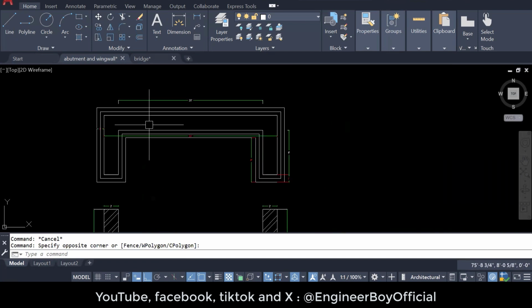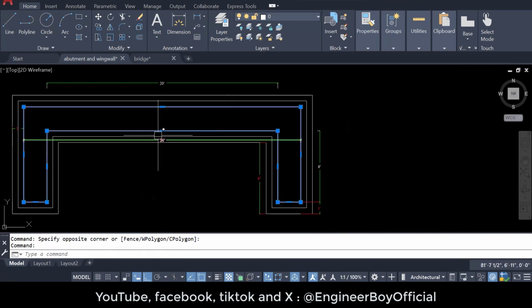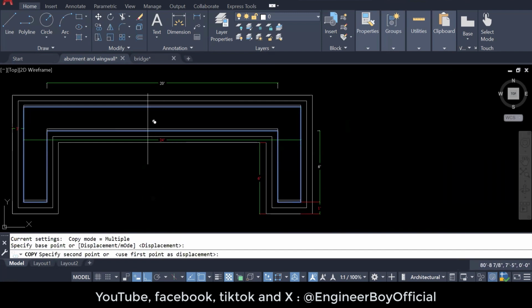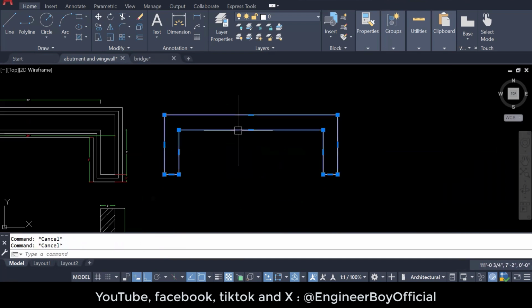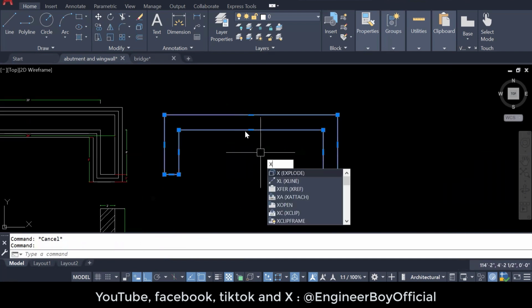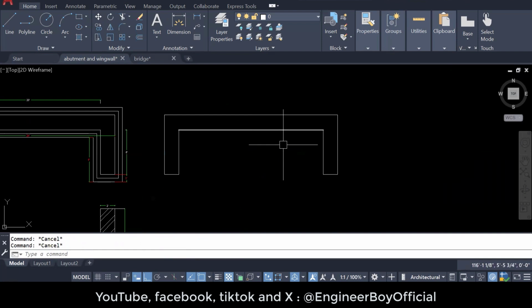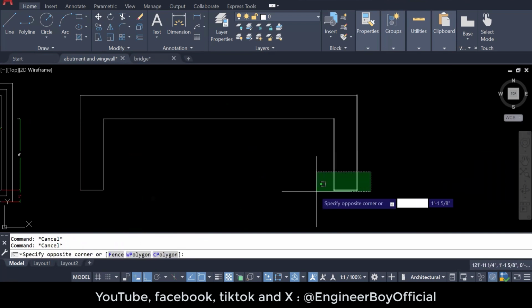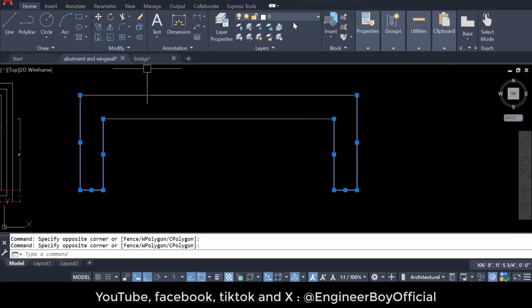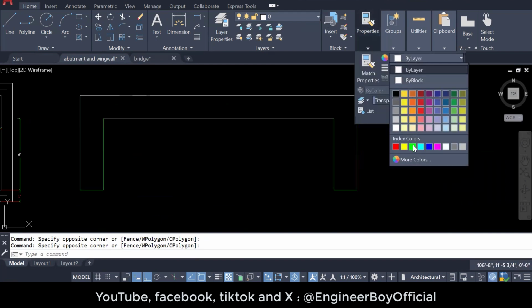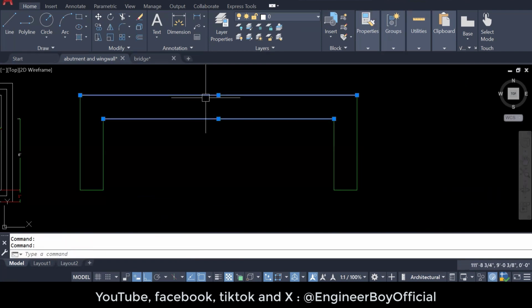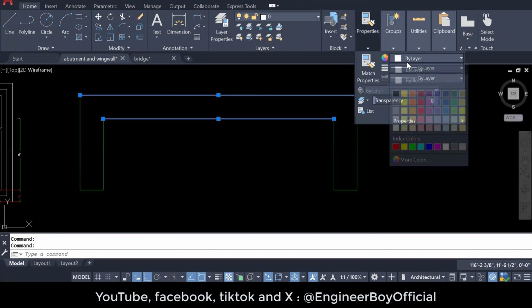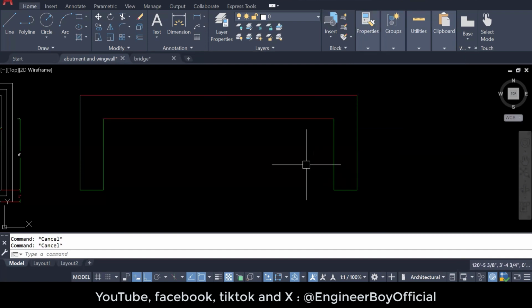For the wing walls, we are actually plastering both sides, and for the abutment, we are plastering both sides. But something which is really wrong over here is actually, let me just copy these things so you guys can see it. Let me explode this one so you can see it graphically. In the wing walls, these green areas can be plastered. For the abutment, these two can be plastered. What do you guys say?